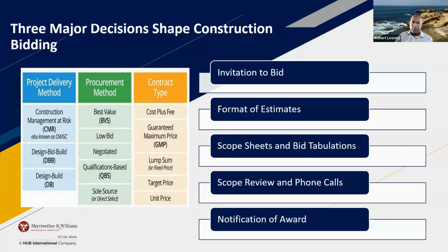That is where you give a number, but at the end of the project, if there are unused costs, that's going to be given back to the owner. There might be a clause in your contract where they'll share some of that unused cost with you. They're going to have a contingency set aside, so if there are change orders, they can go into the contingency instead of going back to get funding. So GMP is open book. It's not like you can just do an invoice for this amount and not give backup. It's an open book process.